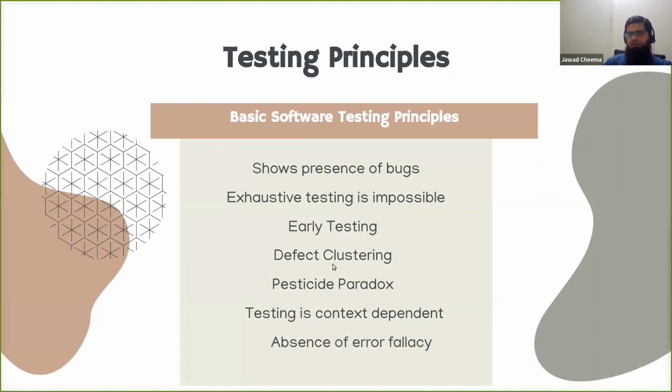In a typical application, you will see there are a few components of the code that are either too complex or were initially written in a very bad way, for different reasons. You will see that most of your bugs are associated with a particular piece of code, and that would always help you understand or plan your testing in a more optimal way. So whenever a piece of code is being changed in that area, or a change is happening that is correlated with functionalities that have a lot of bugs, you need to do some extra checks, some more detailed effort on this, right?